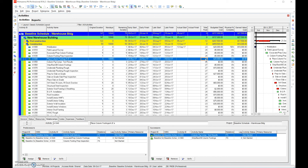If the government is responsible for the delay, you do not do a recovery schedule — because if you redo a recovery schedule you're effectively owning that time. We don't want to do a recovery schedule if it's not our responsibility. We only do a recovery schedule if the delay is our responsibility.